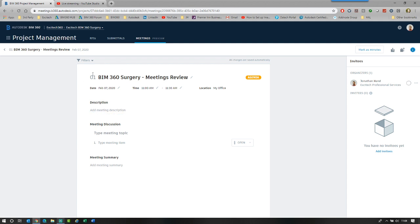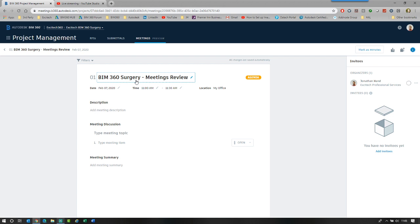The location is my office and you can then start to add in a description. One thing to note is that the title of the meeting is static. That will stay with the meeting. You can edit it. But what I mean by that is that if we create what we call a follow up meeting, that meeting name is carried through. So just be a little bit careful about when you're creating a meeting.